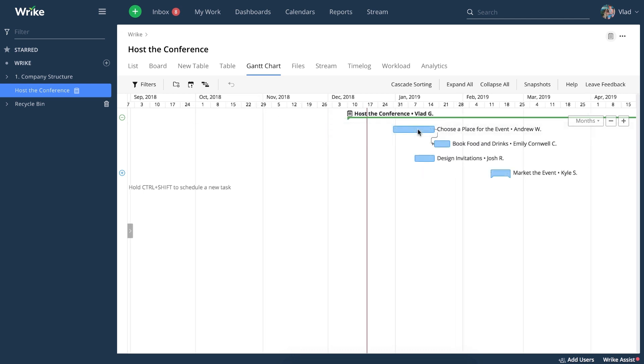You can also add date constraints that indicate the earliest date a task can begin. Once a date constraint is in place, the task can't be automatically rescheduled to a date prior to the constraint.